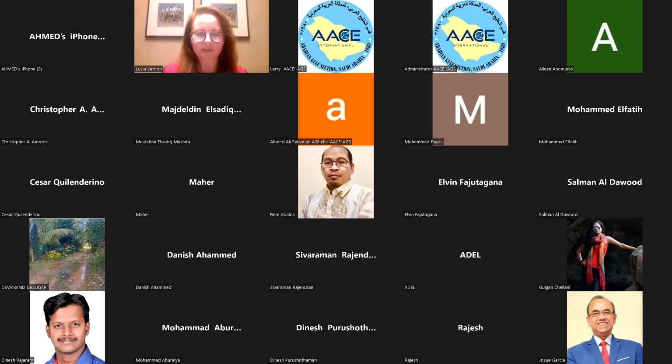So you have to look at the data. You will look at the dates. You will assign the progress. What was the progress? Amount of the resources. This is something what is really difficult because we should be able to actually control resources on a site and report it as per the location. For disruption claim, it's important to have a location where your workers were working. So it's like assigning apples and apples. So you will not get like an overall or global disruption and bump all the resources together and say, okay, we were all disrupted, because that's not true.